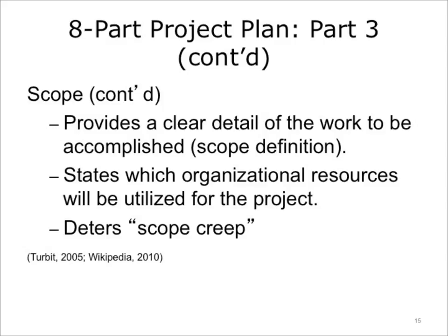Define the scope of the project by determining which criteria constitute maintenance of the product. This will help prevent the occurrence of scope creep, a term that refers to the incremental expansion of the scope of a project as when requirements are introduced that were not part of the initial planning. Scope creep is often due to inadequate planning or a failure to consult all of the stakeholder parties during the project's initial stages, and it can result in costly financial and scheduling overruns.